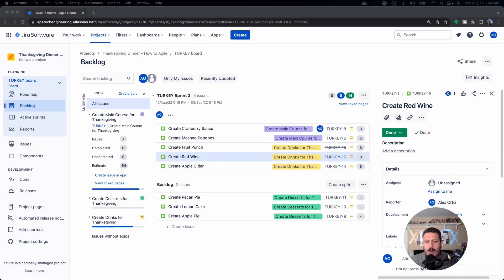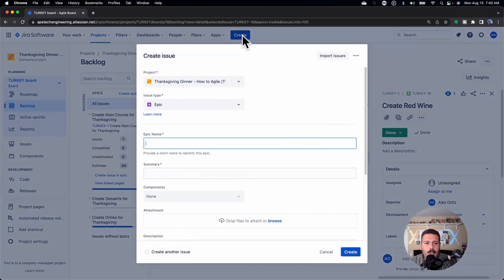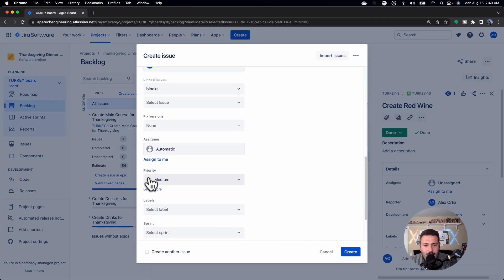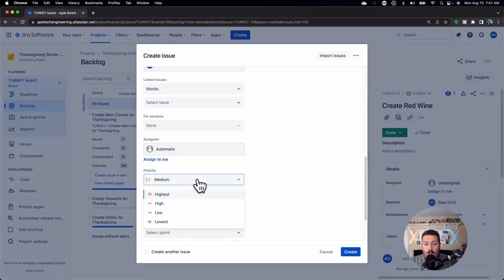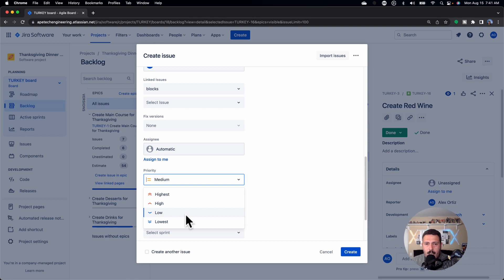First, let's look at what Jira gives you by default. By default, every time you create an issue in Jira, the priority is going to be set to medium — that is the default value. This can be changed, so if it doesn't work for you, I recommend talking to your Jira admin. Full disclosure: any changes to priority within Jira don't just affect your project — it's actually global. So if you wanted to drop the default priority to low or lowest, everybody's issues when created in Jira would reflect that change.